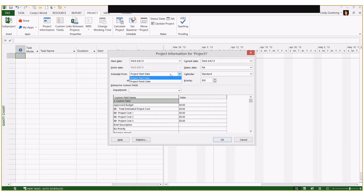If you schedule from the project finish date, every task is scheduled to start and finish as late as possible. You have no slack in your schedule — it's basically a procrastinator's dream come true, but you don't have any room for error. There are some scheduling methodologies that call for that, but for the most part people are going to be scheduling from the start date.